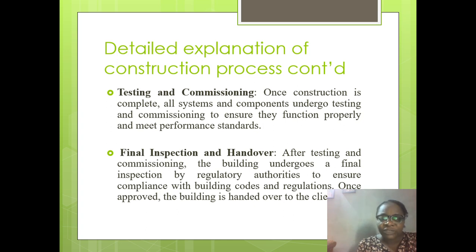Then we have the final stage, which is final inspection and handover. After the testing and commissioning, the building undergoes a final inspection by the regulatory authority to ensure compliance with building codes and regulations. Once the approval is done, the building has to be handed over to the client.